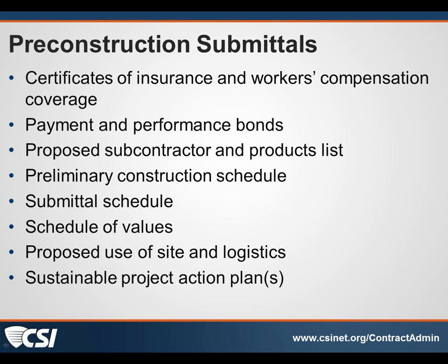And as we may or may not be aware, a concurrent delay, where if the owner at some point during that 30 days caused a delay, or we caused a delay and responded to an RFI in 5 days when we're supposed to respond to it in 3 days, and the contractor comes back and is asking for a delay, I'll tell them, I'm sorry, you don't get a delay, it's concurrent delay, you're behind on your submittal schedule. So all these items, CSI and AIA recognize as pre-construction submittals.